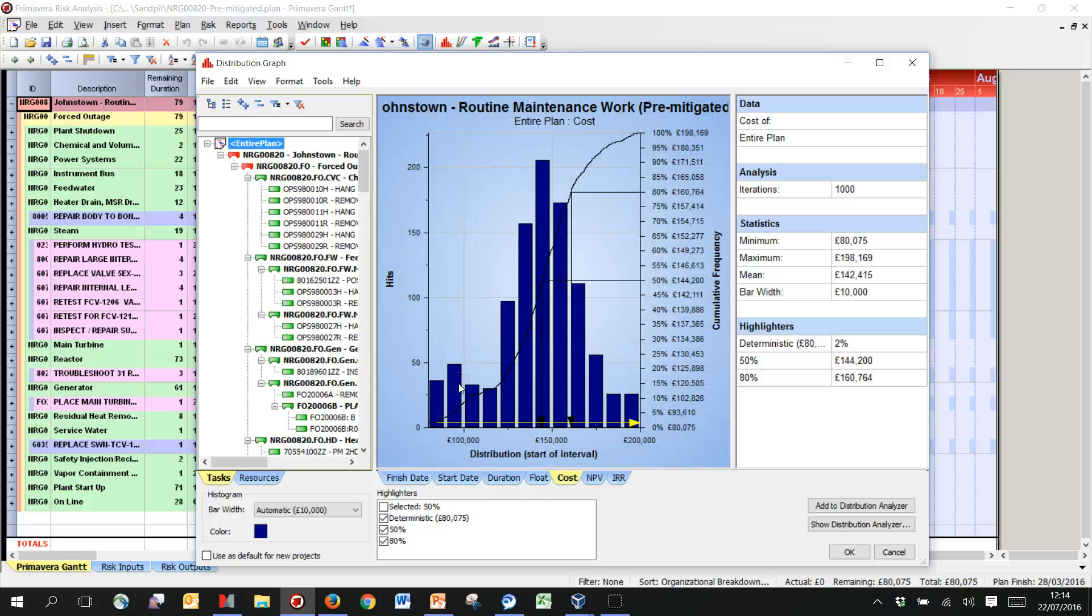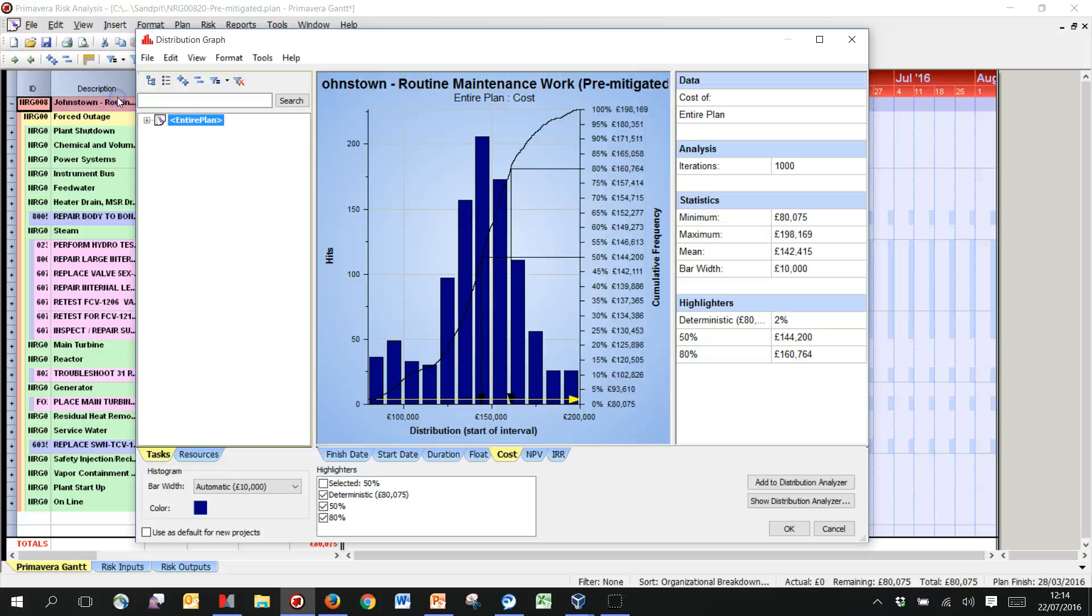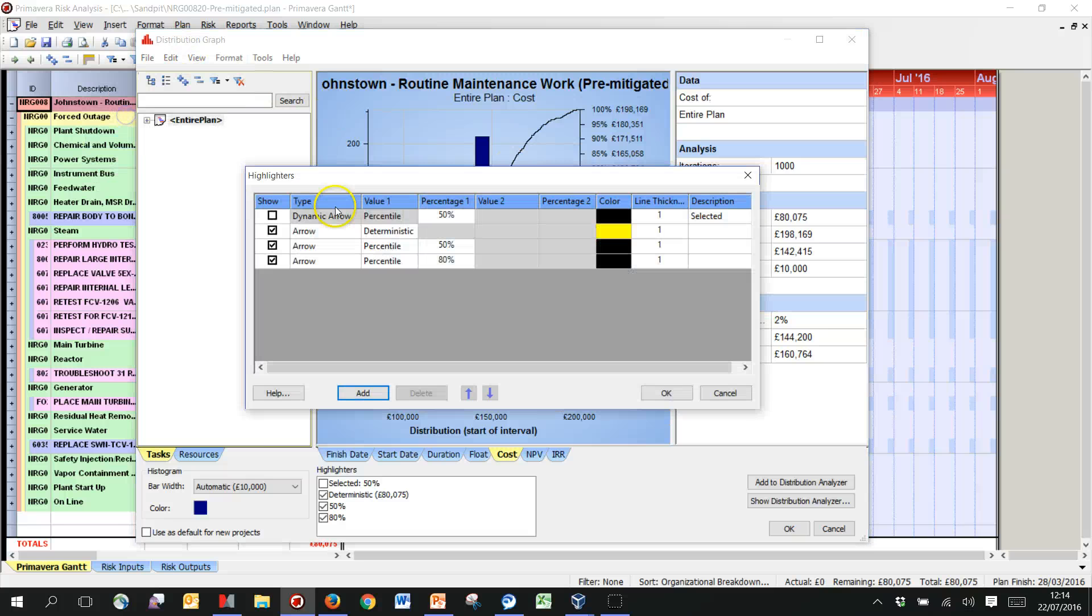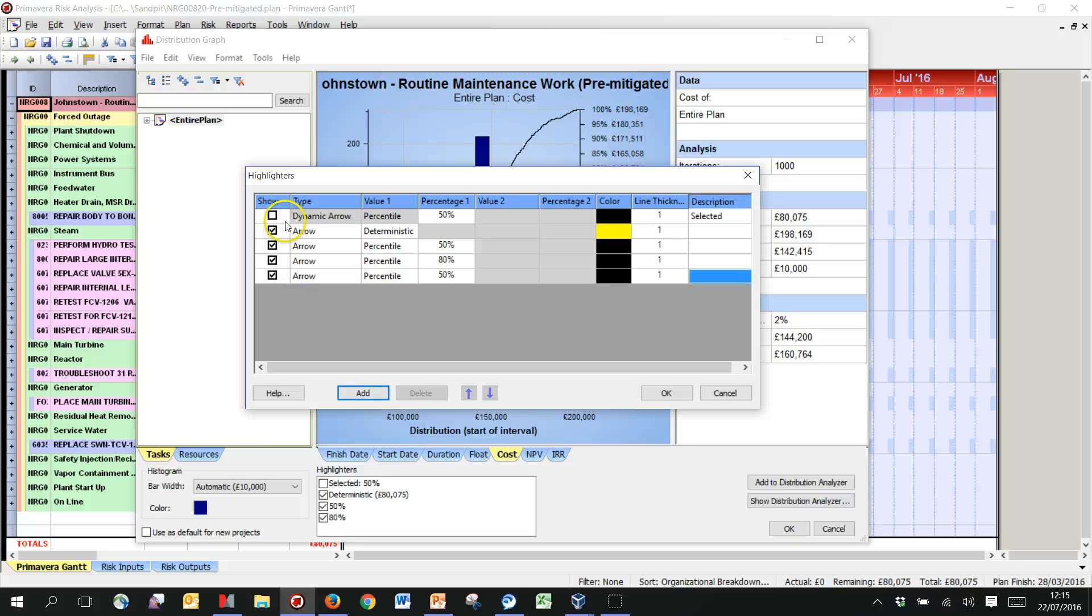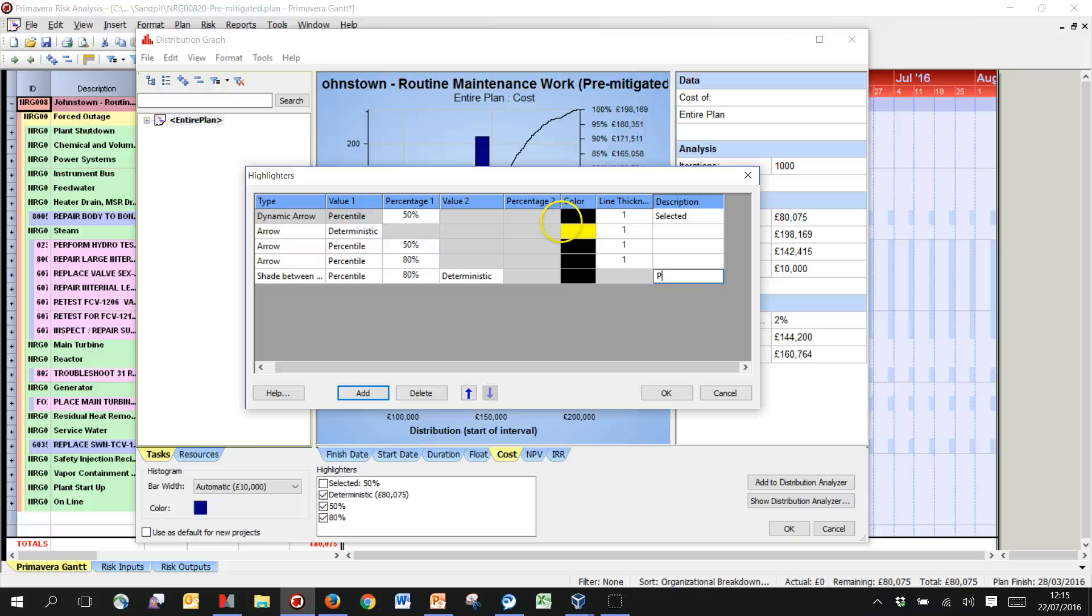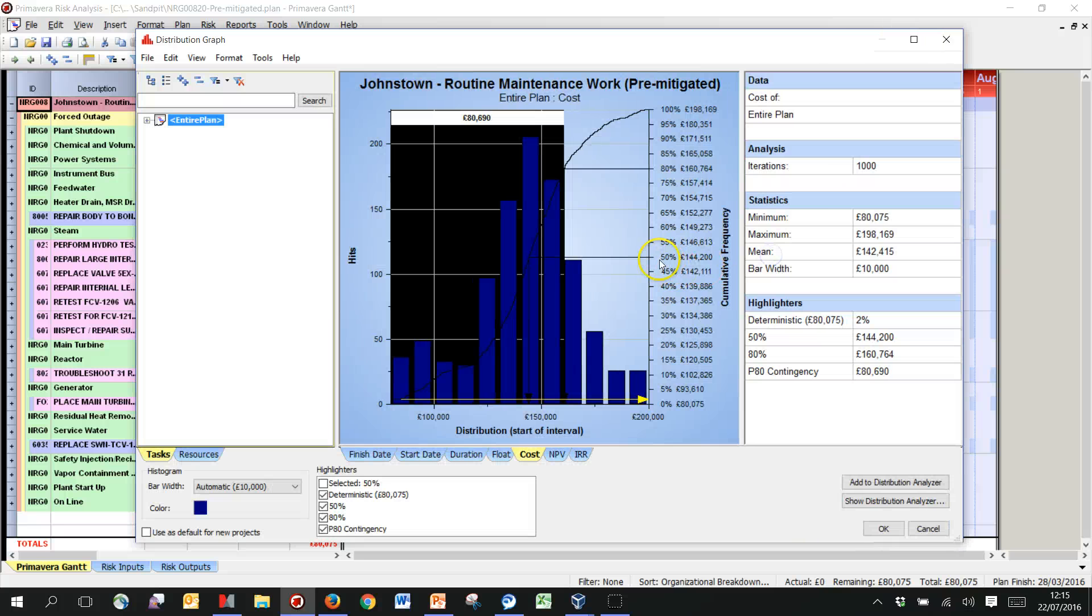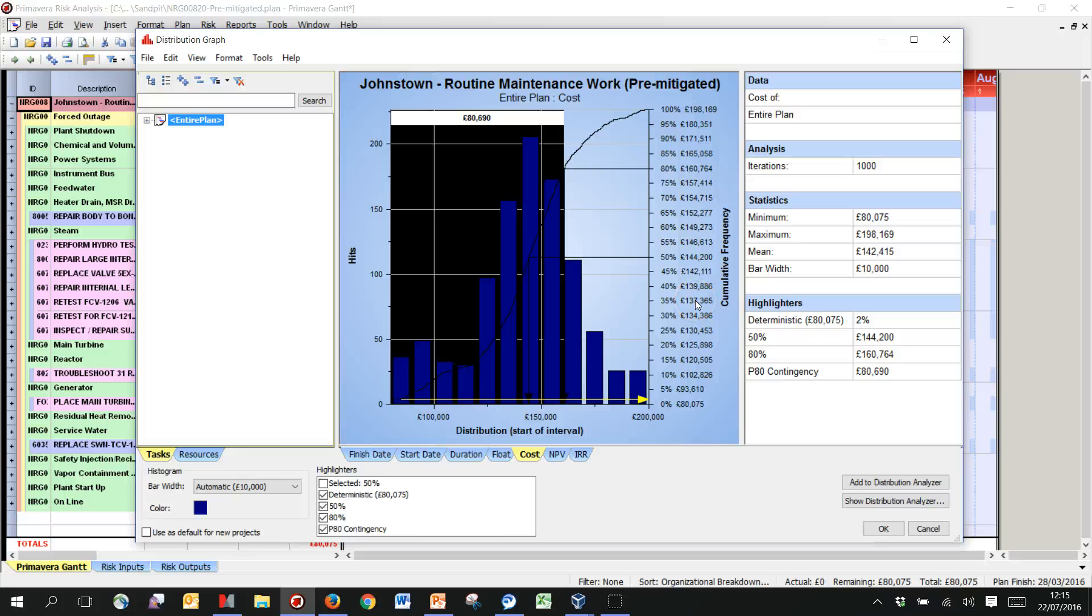We focus particularly on cost. So here we can see our base cost. Actually, let me quickly add on, I think it's useful to see the difference between P80 and deterministic. So as useful to see this, this is just a way of displaying on here the P80 contingency that we're going to be adding in here, so it's 80,690. So we can see the deterministic value is roughly also 80,000. The P80 is 160, so the P80 contingency is also just a little over 80. So contingency is roughly the same size as the project.